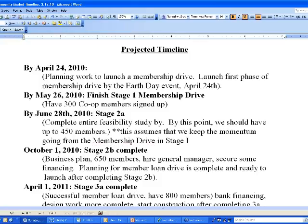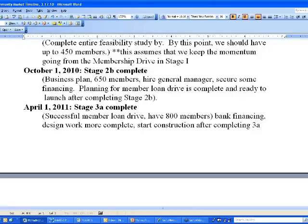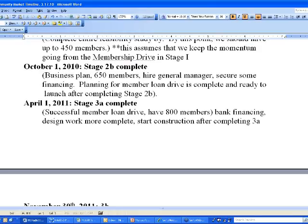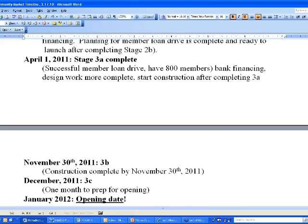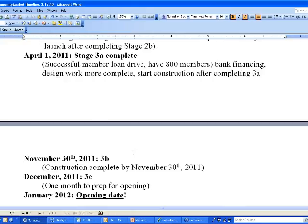By October 1st — July, August, September — three months to complete stage 2B, which means having a business plan complete, members up to 650, hiring a general manager, and securing financing. Planning for a member loan drive is complete and ready to launch. At the end of stage 2B by October 1st, they will have theoretically secured a site with a contingent agreement that defines their rental structure. Then stage 3A goes from October through March of 2011 — six months — when they complete a successful member loan drive, have 800 members, all bank financing in place, all design work complete, and construction starting once stage 3A is complete. Stage 3A is that final decision point — do we have everything in place, is our feasibility work still holding up, are we ready to cross over the line of no turning back?